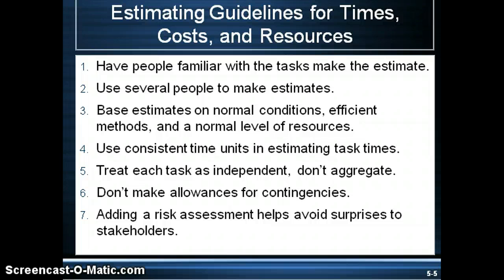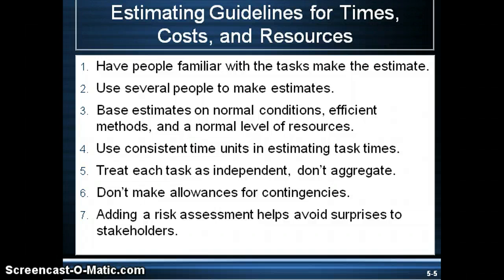You need to have people familiar with the task making the estimates. If possible, get several people to give estimates so that you get a good pool of information. Always base estimates on normal conditions, as it's too hard to predict what may happen; you'll address conditions that could affect the project later during risk assessment. Each task should be estimated independently of other tasks. Although many tasks are interdependent, for the estimate you don't want to show that interdependency, so you get an accurate assessment of how long each task takes, refining it later in the project.